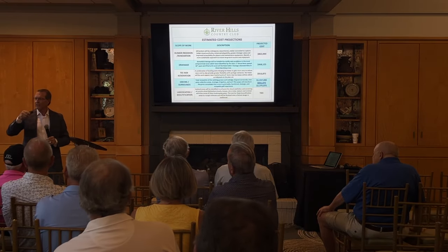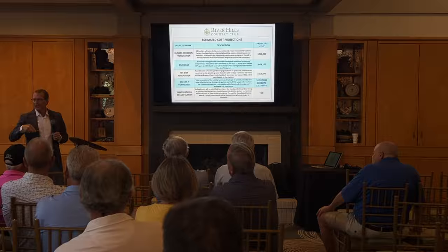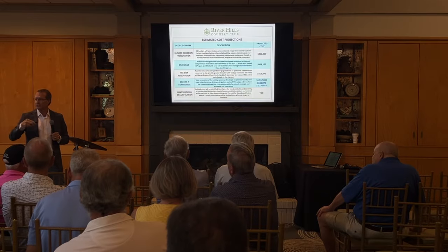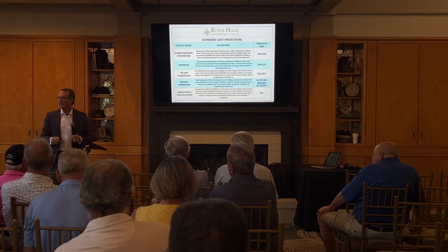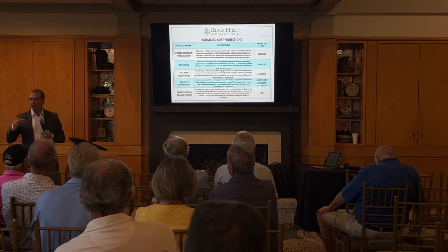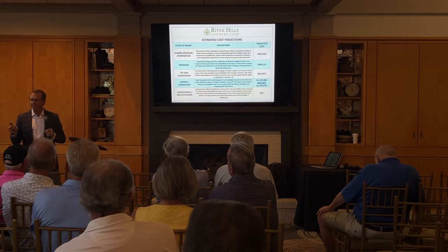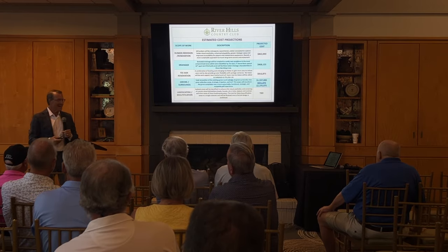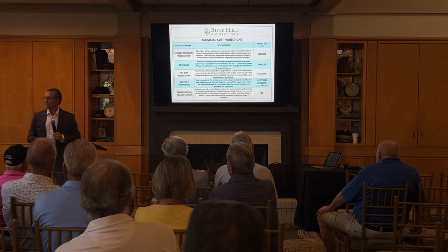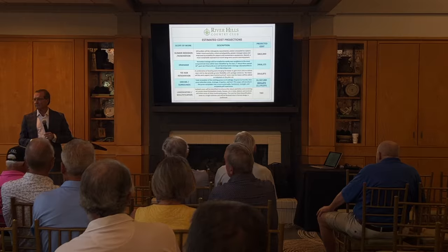But when you put it all together, which includes more than this as far as permitting, contingency, etc., it's just not shown. Each one of those has a mobilization and demobilization, so there are multiple tasks done at the same time. So if we add these up, this isn't the total. The subtotal.